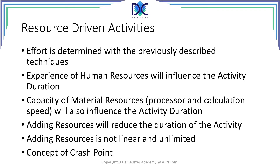Let's have a look at resource-driven activities. The effort is determined like we described in the previous session with the same techniques. We also saw that we could estimate project effort when we count in the experience of the human resources, or the people that we allocate to these activities. The same applies to the capacity of material resources like processors and calculation speed — those also will influence the activity duration.